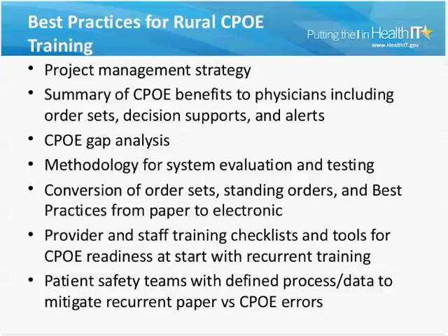We want to make sure that in the implementation process we capture the current order sets, standing orders, and best practices that are being utilized in the paper paradigm so they can be transferred over to the new electronic tool set. This is an absolutely critical step for allowing doctors to more easily take up the CPOE methodology.